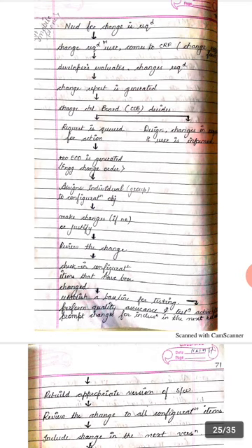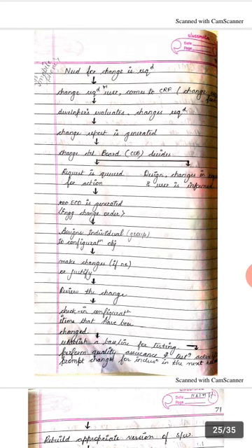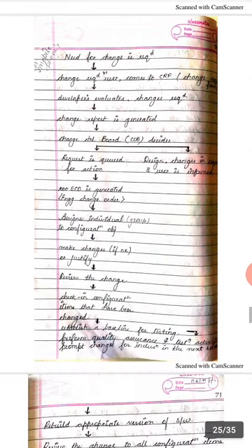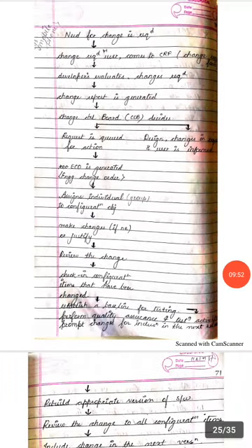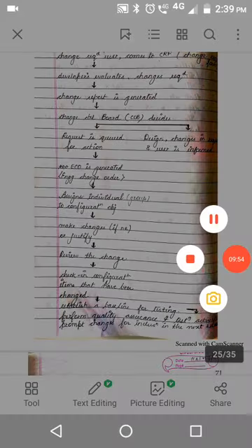Whomsoever had made the request for that change is informed that the request for the change is ignored or denied. On the left hand side you can see that the CCB request is queued for action because there may be many requests for change. So the changes which are considered to be incorporated are queued.